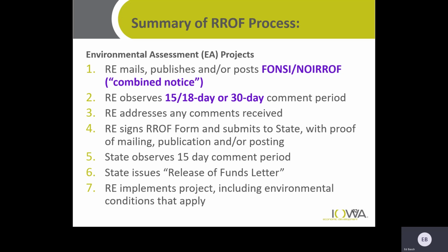So environmental assessment, a little bit different. Again, you have the combined notice of the FONSI, notice of intent to request release of funds, finding of no significant impact. In this case, you have a 15-day local comment period, 18-day if you post. A 30-day comment period only comes into play if you have a floodplain project, which we're going to talk about in segment 3 or 4 of this whole training, and you don't do a combined floodplain FONSI notice, then it would be 30 days. But I don't know why anyone would not combine them unless they couldn't help it. So the vast majority of time is going to be 15 days, and then for the very small communities, 18 days.